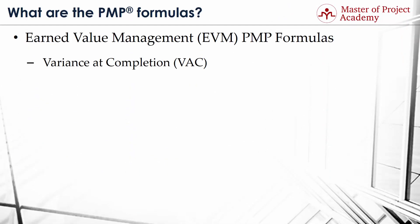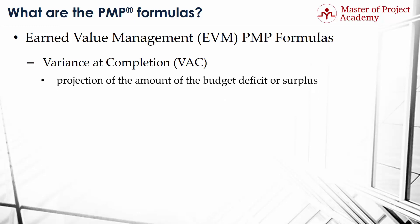PMP formula number 10: Variance at Completion or VAC. Variance at Completion is a projection of the amount of the budget deficit or surplus. It represents the difference between the budget at completion and the estimate at completion. Accordingly, its formula is: VAC equals BAC minus EAC.